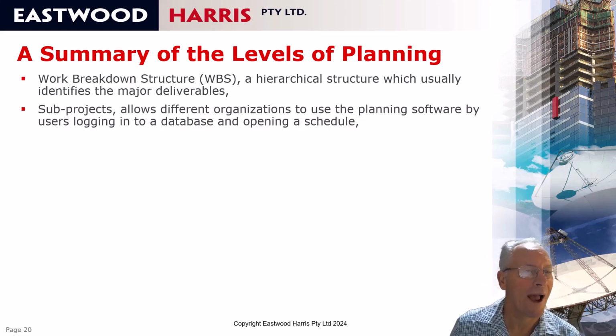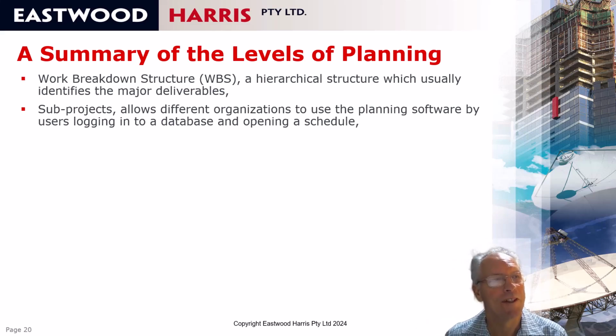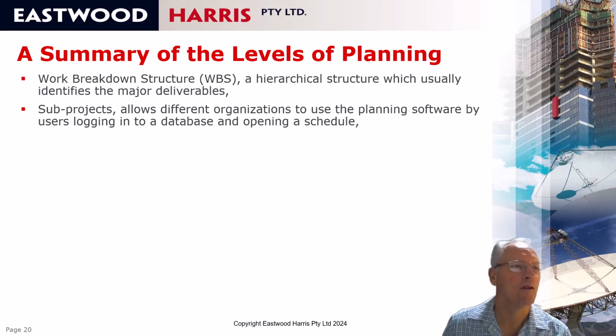A number of people add sub-projects, allowing you to have multiple P6 projects to represent a single contract or project you're executing. This is quite useful if you've got a number of different programmers working on a project, and therefore you would probably create a P6 project for each programmer that's working on the project.